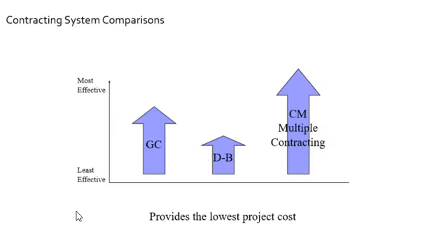All right, and now we'll flip through a couple of slides very quickly and just discuss these three delivery systems in terms of who does what the best. So providing the lowest cost is the construction management scenario. That construction manager is on board early on, they grow comfortable with an understanding of the project, and they provide that GMP, that fee, the fee for building the project, guaranteed max. So this is the best scenario for that.